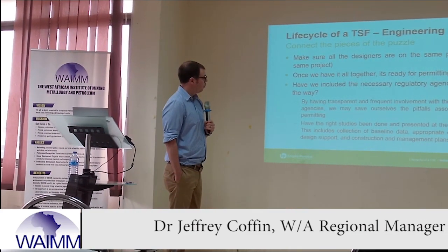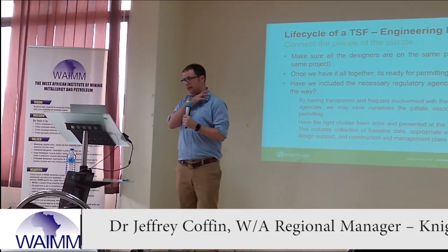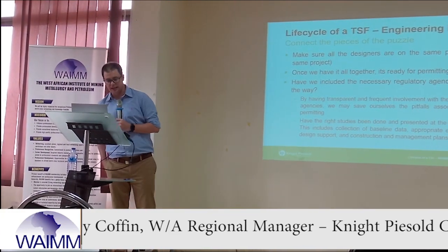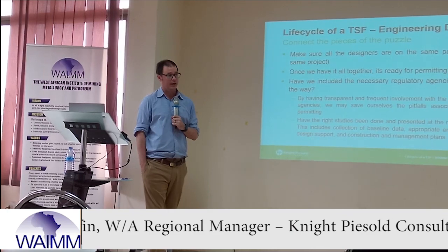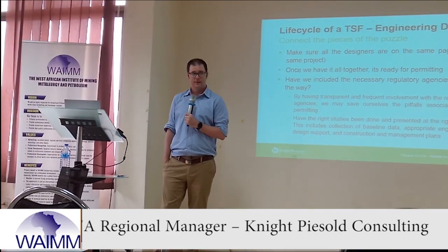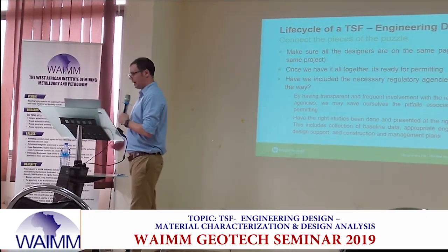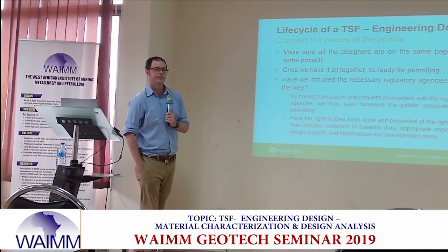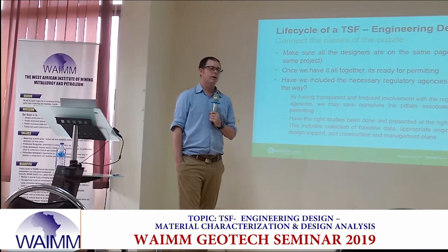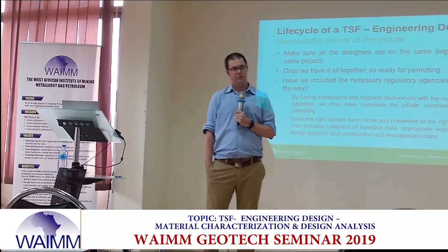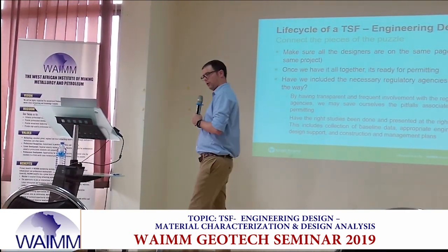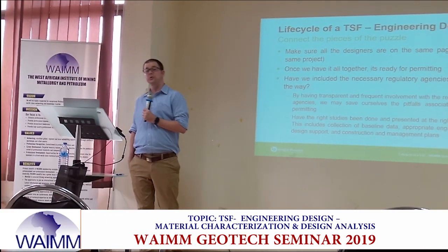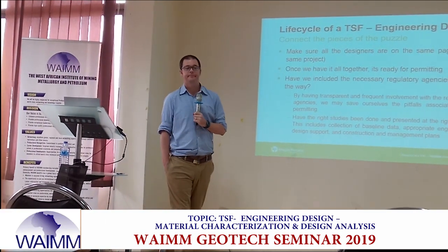Right? Once we have it all together, it's ready for permitting. And the big question is, have we included the necessary regulatory agencies along the way? Right? Or are we going to walk up to them and say, hey guys, here's our permitting packet, please give us a permit? We don't want to surprise the regulators, because the easiest thing for the regulators to say is no. And they don't need any justification for it.